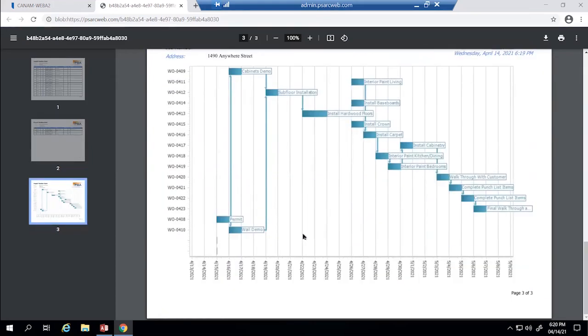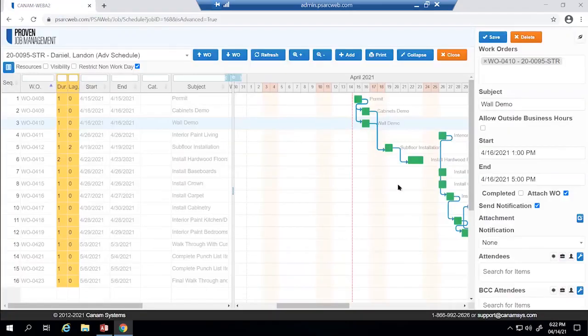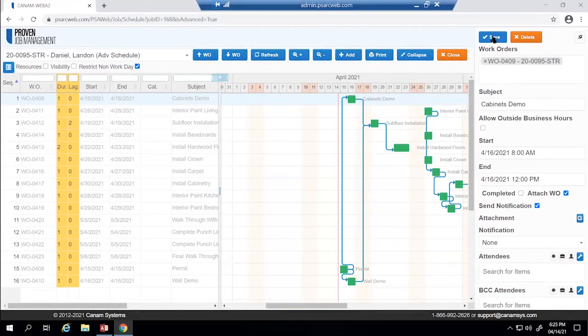The dates on the x-axis will modify themselves depending on your timeline to ensure the best visibility for the printed version. You have the ability to dictate what populates on this printed version, and that is where we can change the visibility status. This option will be back in our schedule feature here. If I created a work order for a temp pole, dumpster, or a temporary fence, I want to have those work orders created for financial purposes, but I don't necessarily want them printed on the timeline. That is where the visibility eyeball icons come into play.